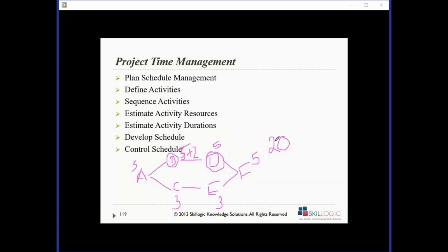That's because as long as we know that there is available time, we would not start the work. Towards the end, when we know that the time is limited, there is no other go, that's when we actually start. So even if one activity gets delayed, the other activities tend to get delayed too. Even if they get completed in time, my overall project will still get delayed.